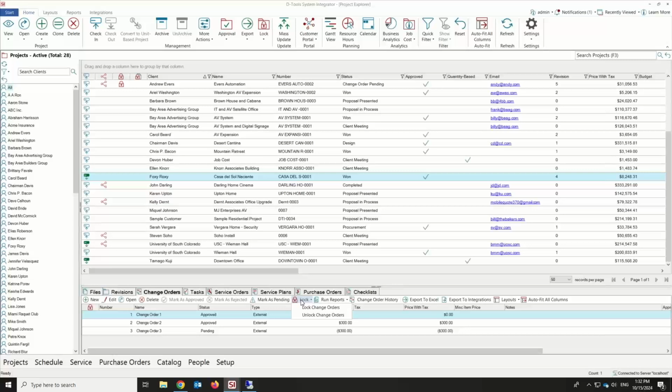Speaking of change orders, when we approve a project, which is one of our features we added a while back for the new change order process, that's when it triggers change orders to become a thing. Every change you make moving forward on an approved project becomes a change order. And we lock down almost every single field on that item, with the exception of a few.